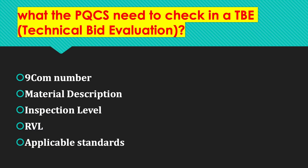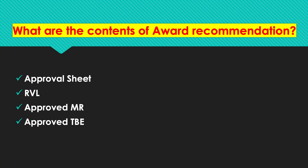What does the PQCS need to check in a TBE or technical bid evaluation? The PQCS should check that the 9COM number is correct, material description is full and correct, inspection level is right, the regulated vendor list related to the material is attached, and applicable standards are included. What are the contents of an award recommendation? Approval sheet, regulated vendor list, approved material requisition, and approved technical bid evaluation.